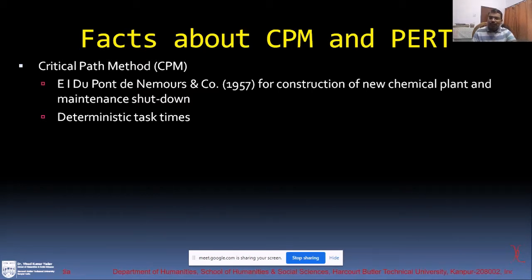If going from west campus to east campus taking 5 minutes is not determined, you are about to calculate on a probabilistic model. That means it may take 10 minutes maximum, minimum 5 minutes, and on average 7 minutes.